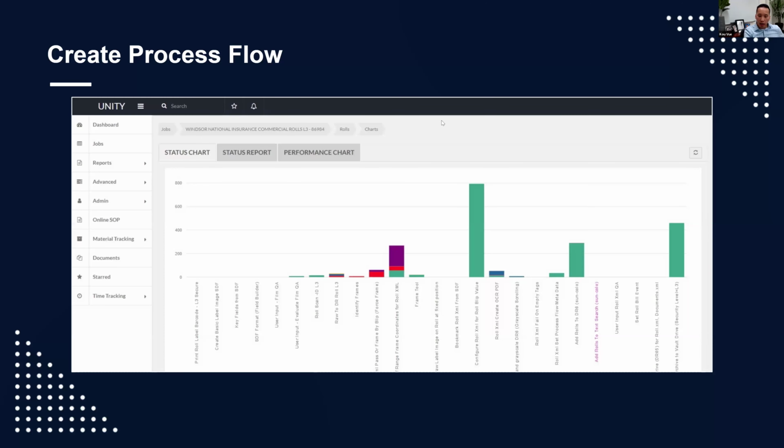So like I said, it helps iron out any kinks that we may find in the milestone process. Any film quality issues, any keying issues, any labeling issues that might have occurred, that'll help alleviate some of those issues early on, so that we don't have those problems as we're going through the project. What we found in our years of doing this is that it really does take the burden off the back end, because it answers a lot of questions up front while we're doing the milestone process.